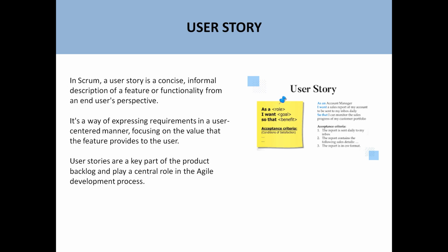For example, you are implementing an e-commerce store, and the customer wants the user to be able to make the payment through a credit card. This is a feature required in the e-commerce solution, so this feature will be considered a user story in the Scrum framework. Also, the user can select a product from the catalog of products.